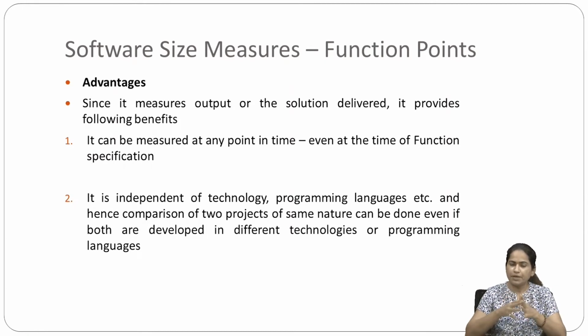It is independent of technology and programming languages, and because of that, comparison of two projects of the same nature can be done even if both are developed in different technologies or programming languages. In LOC, if you want to do the comparison, it will be difficult if the language is different, or the technology used is different, or the persons working on them are different.